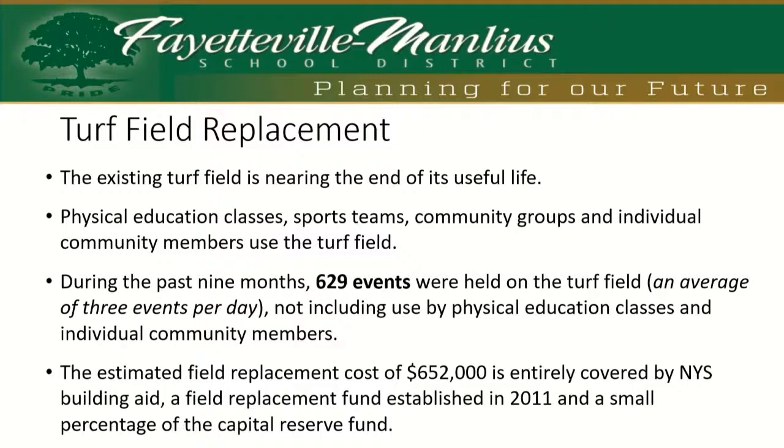So we also will be using a field replacement fund that was established about 10 years ago. Now that was about $101,000 out of private money that was set aside in a trust and agency account here that we have been stewards of. But if you take a look at what about 20% of that figure is, there is not that much of a difference between that and what money was set aside over a decade ago to cover the local share that's needed. So I wish I could predict in terms of 10 years down the road. Certainly that private money that was set aside will serve a good purpose in defraying most of the local share for that, the difference being about $27,000, which will certainly be covered by the capital reserve fund that we have set aside.